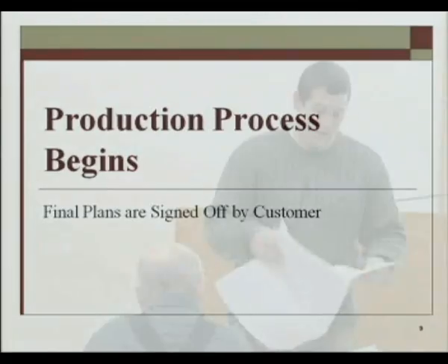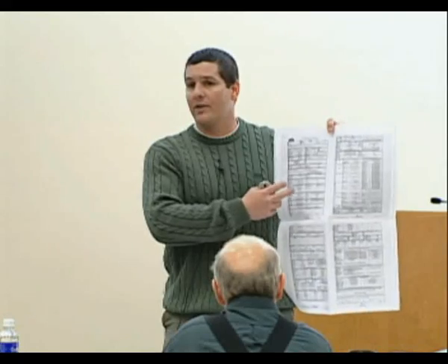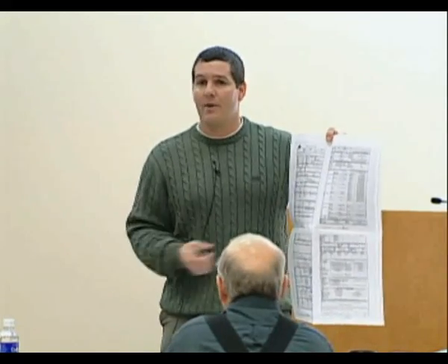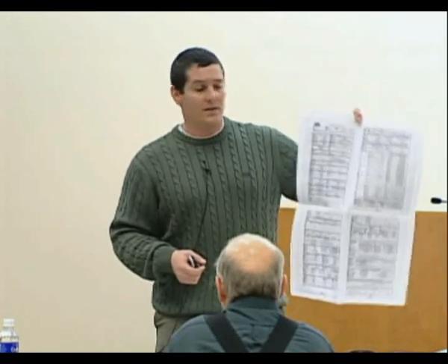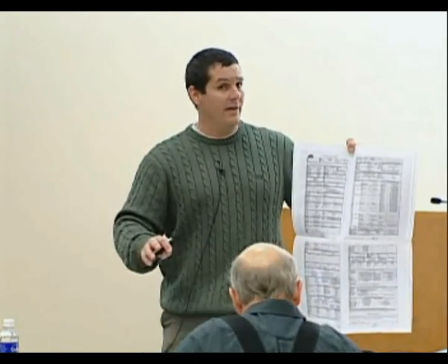Typically what we do at the end of the pre-dig process, that's what the front of our plans look like. So we have everything from the top of foundation elevation down to the cabinet pulls that they're going to put on their master bathroom vanity. Okay? So once the customer goes through this item by item, they'll go through it line by line, and they understand everything. They'll sign all 4 sheets of paper here, and they'll sign their name. Now we're ready to roll. Okay? So what we've really done is we've set the expectations for the customer, and we understand what those expectations are, and now we can launch off into hopefully a productive and profitable building process.